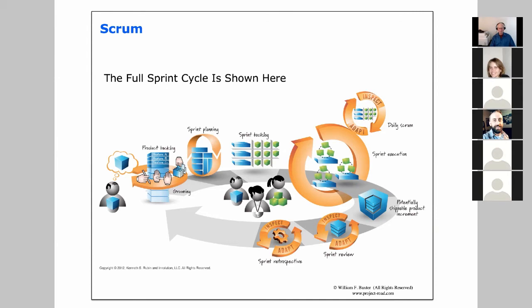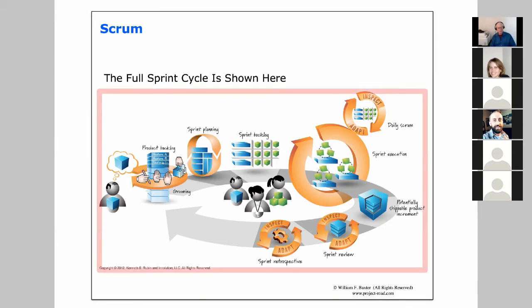So within each sprint cycle, there's going to be some product backlog grooming, shuffling user stories around, getting enough user stories sprint ready for the next sprint planning cycle. And so then at the beginning of the sprint, we do the sprint planning where we figure out how many user stories we can reliably complete in the next sprint. And we want to try to take in only that many user stories. And then we form our sprint backlog of the